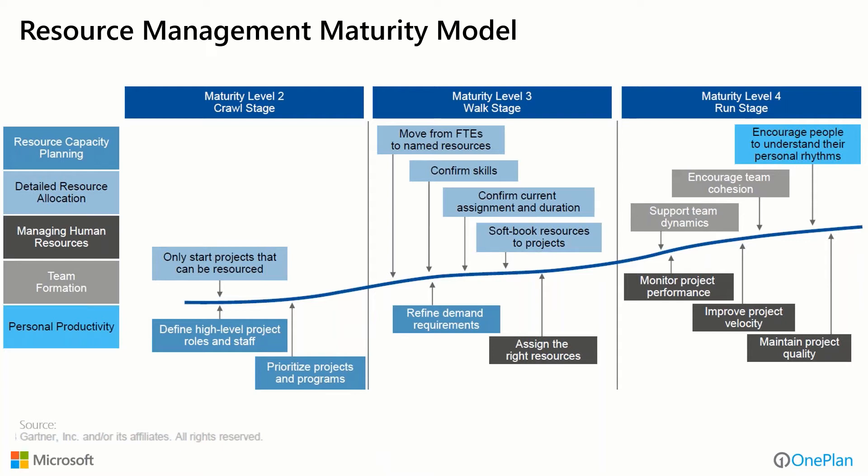At the next level of maturity — the walk stage, level three — we bring in more detailed resource allocation. We refine demand requirements, which may be adjusted once we build a detailed plan, and then we assign those detailed resources to the right things at the right time, factoring in skills and other considerations.